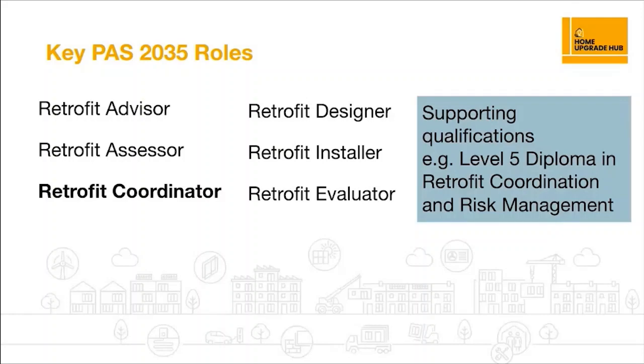The designer is a person who's qualified to prepare a retrofit design. So the requirements for that do vary, depending on the level of risk. But basically anything above Path A is likely to need people like registered architects, construction managers, building surveyors. And for Path C, which is traditional buildings as an example, you also are going to need somebody that holds a special traditional building qualification.